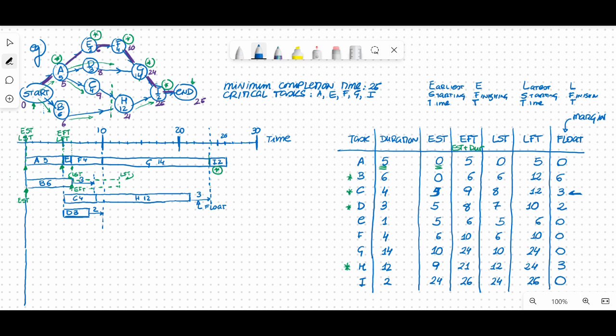Okay, we're almost done. Now we need to wiggle all these non-critical tasks because I don't want to be using 3 different teams if I don't have to. So for my scheduling, the first team, the easier way of doing it, is putting them in the critical tasks, because you know where they have to be, and just leave them there. Don't touch them, don't sweat it. You know that's the only place they can go.